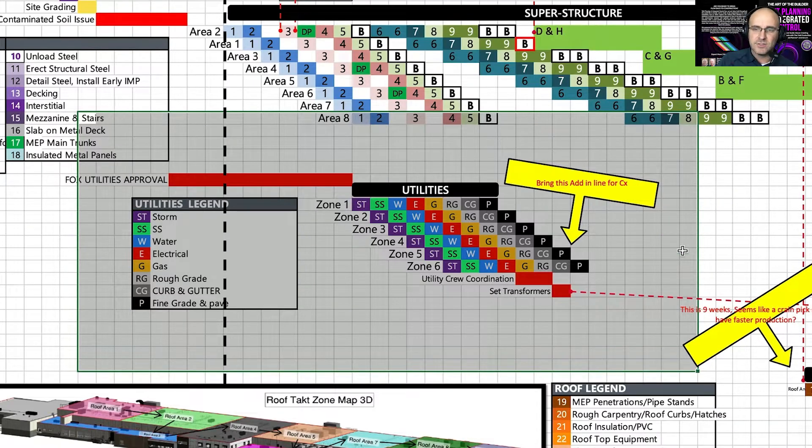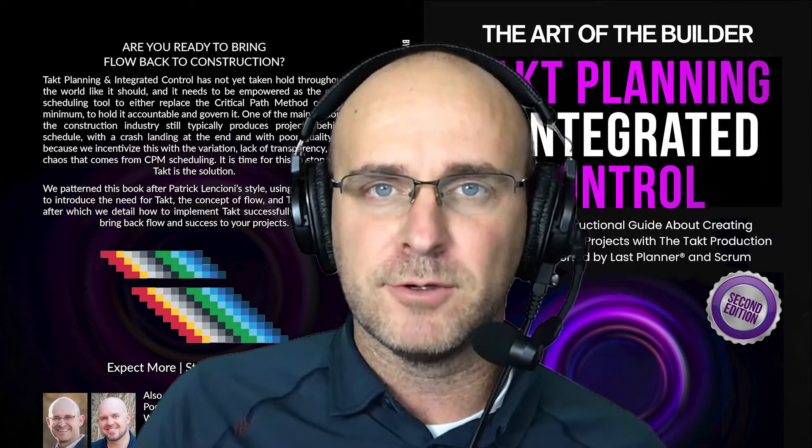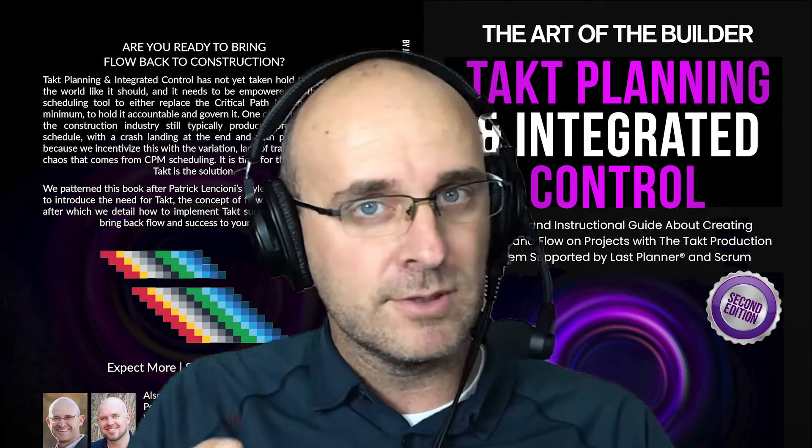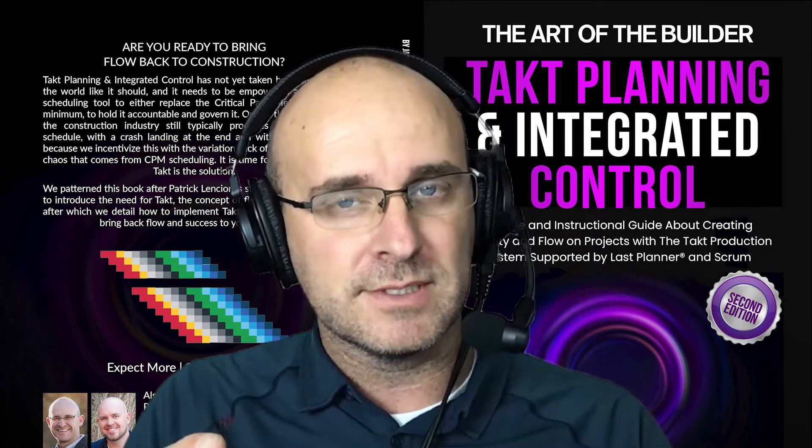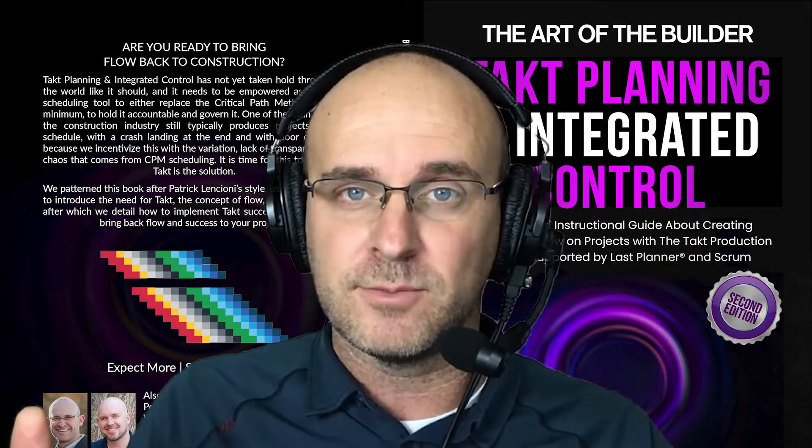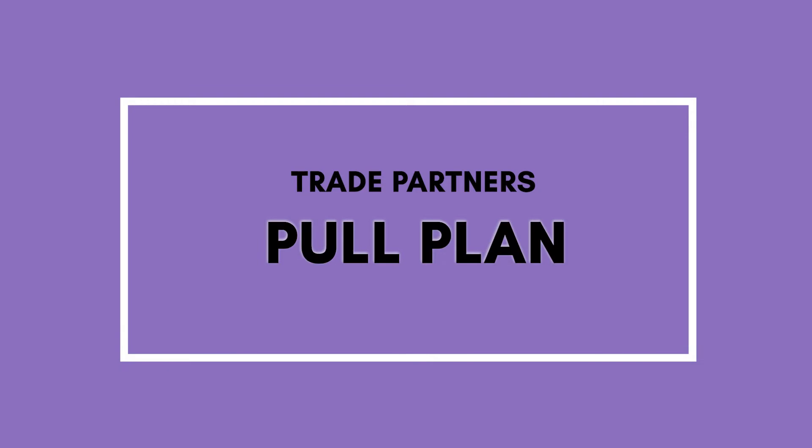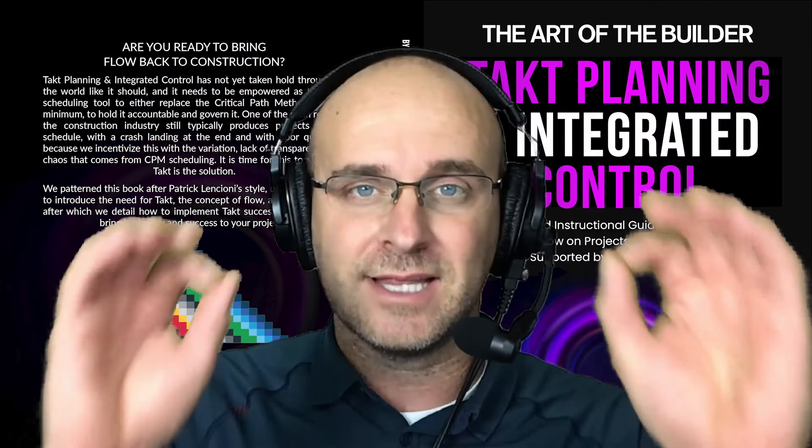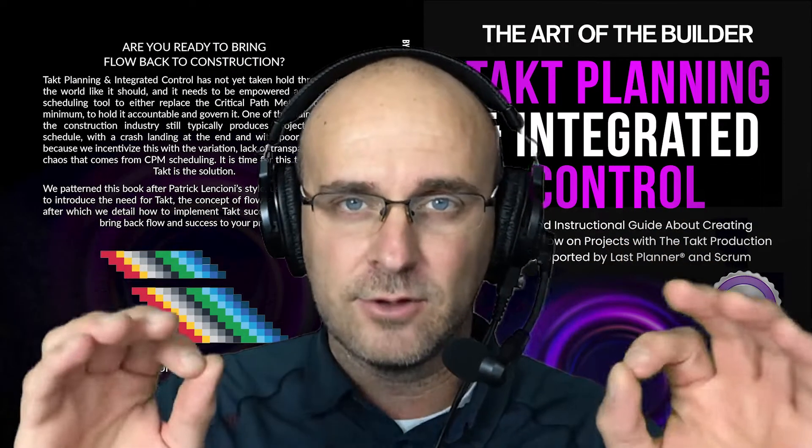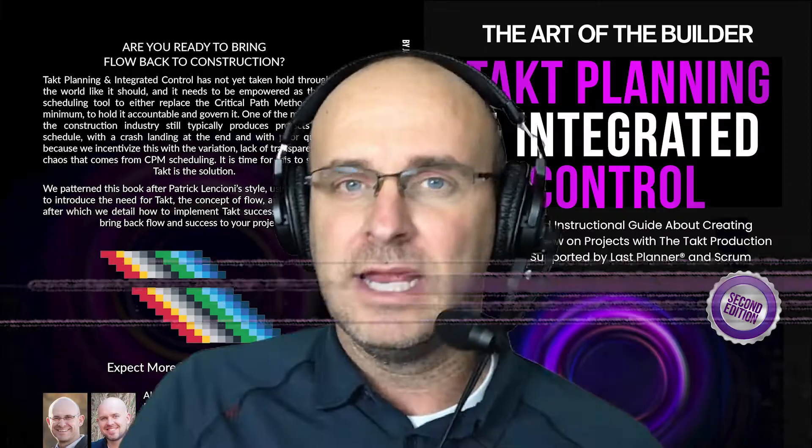In order to make sure that that sequence or that phase is correct, it must be pull planned. But when this original plan was put together, we didn't have the trade partners on board. And so when those trade partners are on board, we get to pull plan it and make sure that that phase and those sequences are absolutely perfect.